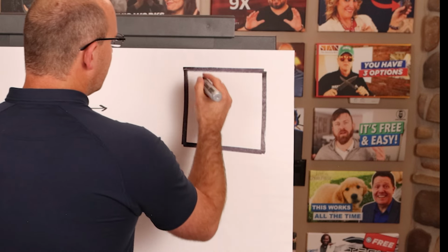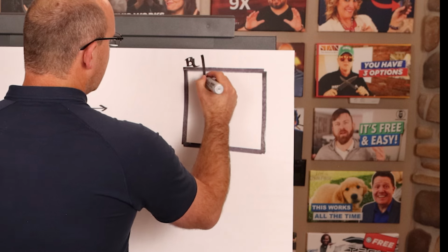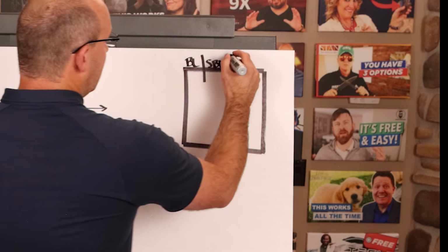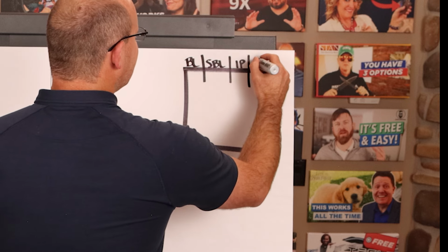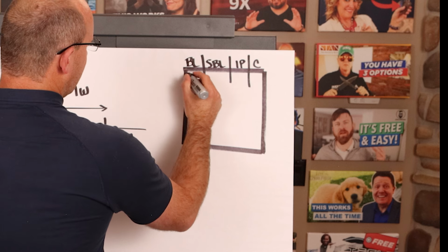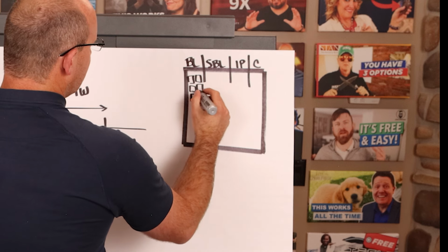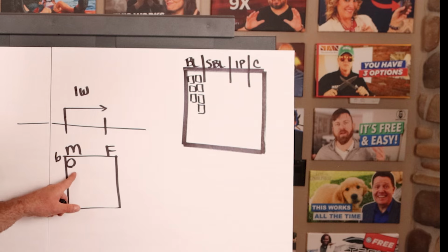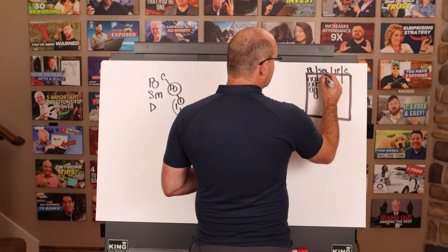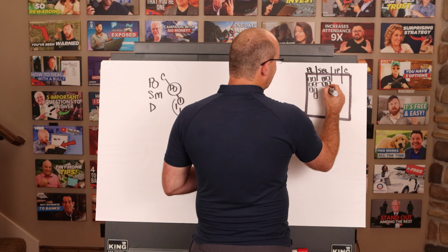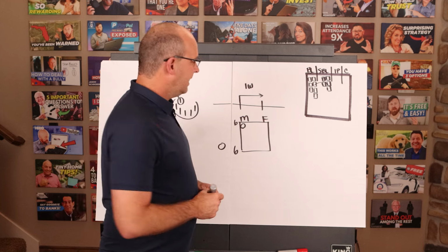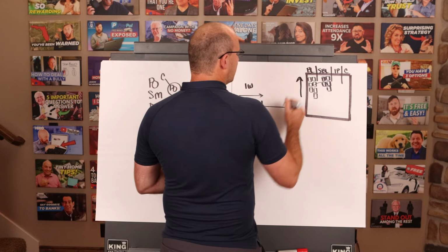And I'm going to give it to you simple. There's backlog, okay? There's sprint backlog, which is what you're going to do in that timeline, okay? Then there's in progress, and then there's complete, okay? So imagine that you have a bunch of stickies in your backlog. These are things that need to be done, right? When you do your sprint planning, you are going to move certain stickies over there that say, hey, our team, we think that we can get these tasks done in this amount of time. This is what we're doing. This is our focus. And all of these are ordered in the right priority, okay?